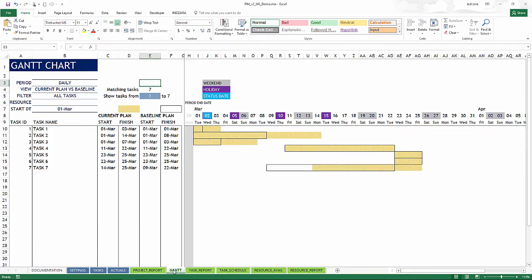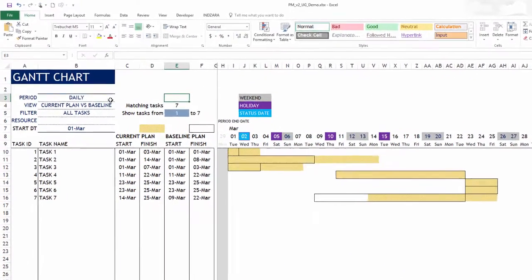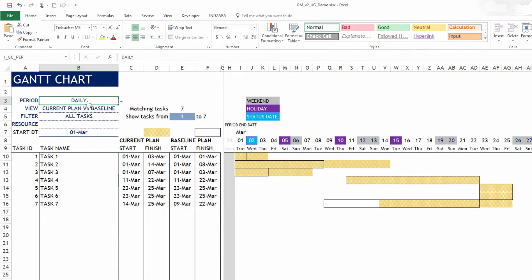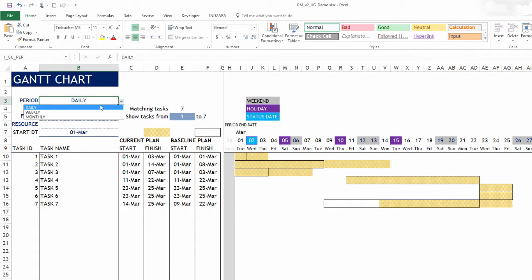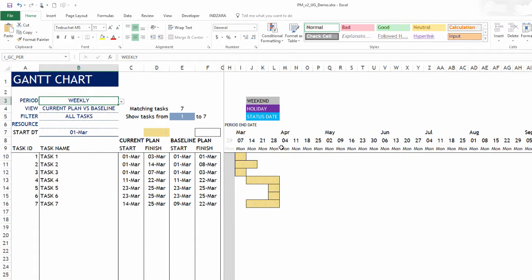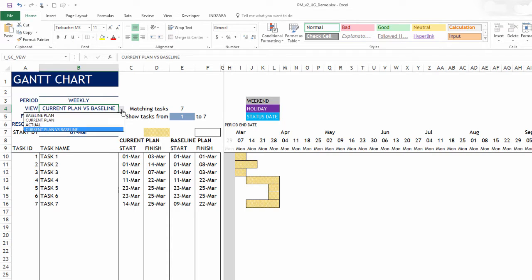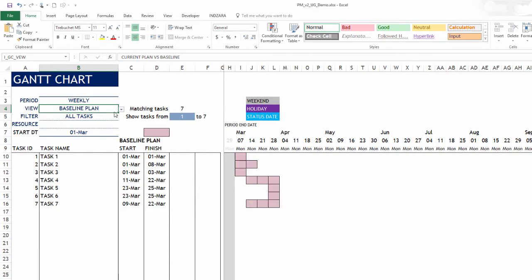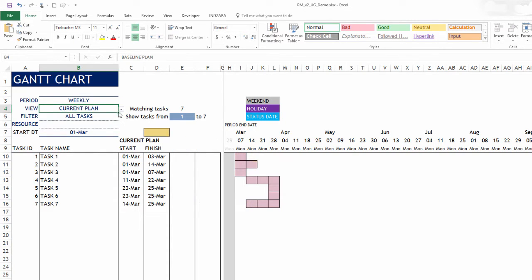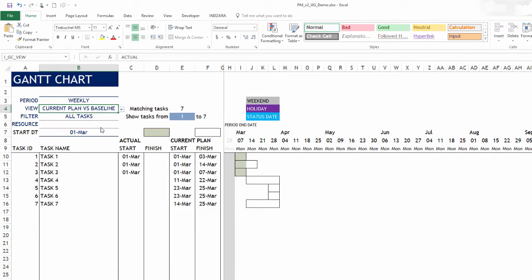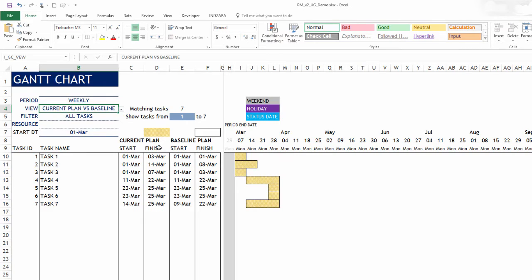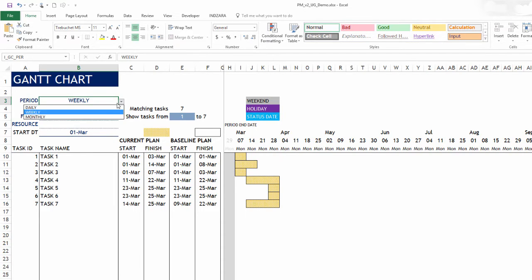The Gantt chart sheet is where we can visually see the project timeline. And this is a very customizable Gantt chart where you can change from daily to weekly to monthly. And you can change the view whether you want to see only the baseline plan, whether you want to see the current plan, whether you want to see actual work performed and then the current plan versus baseline. So all of these details are available to you.